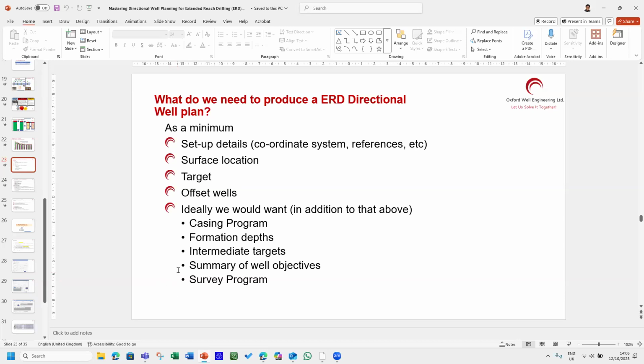So very much common sense approach here. And just going about the planning is okay, very nice. You would like it. But be aware of these things that you have offset well. Do you have an offset well in your database? You need to import them if you don't have it in the system. Not just import them, verify the locations, verify the positional uncertainties.